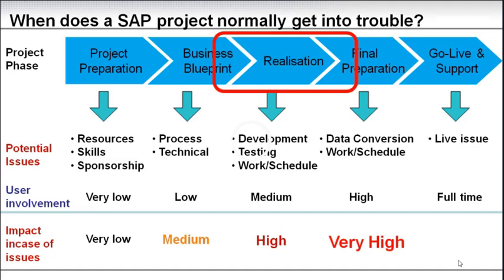And again, to stress this in the red box here, normally the project gets into real trouble when they get to the sign off of the business blueprint, during the realization, and when they start the data conversion activities in final preparation.